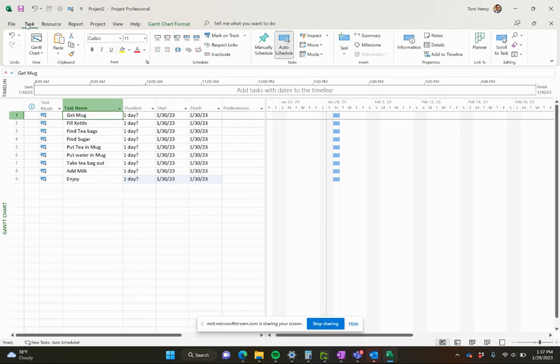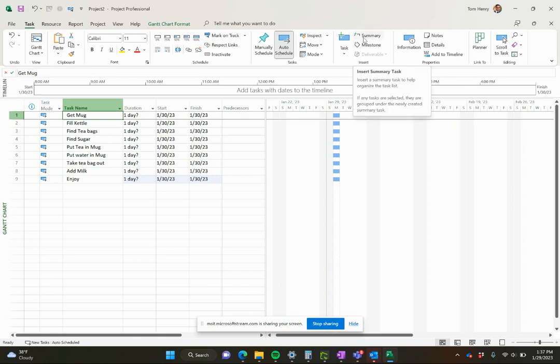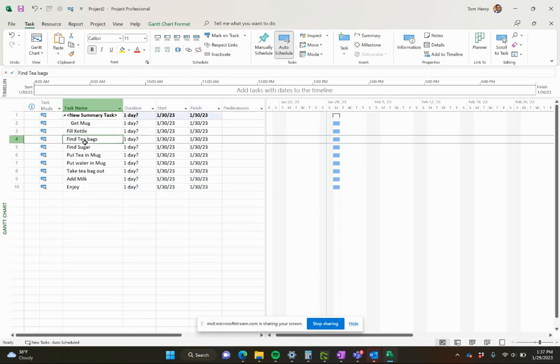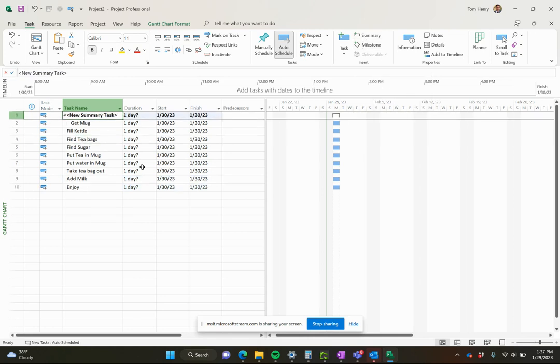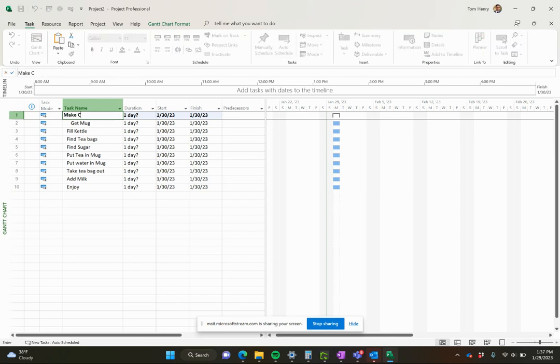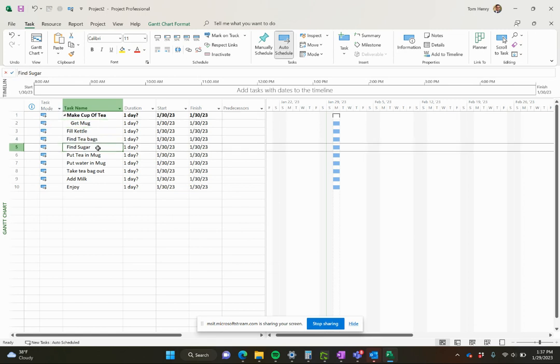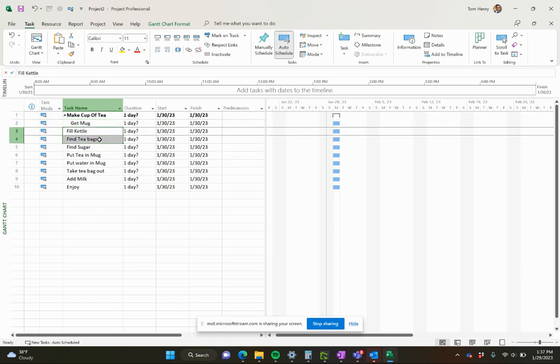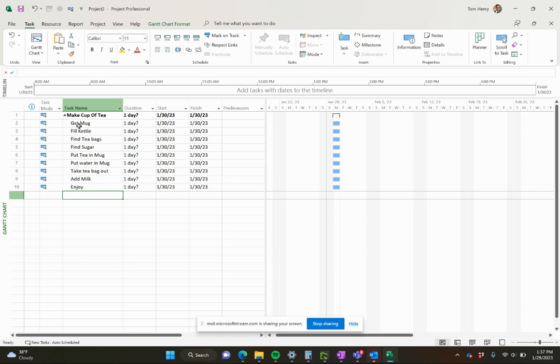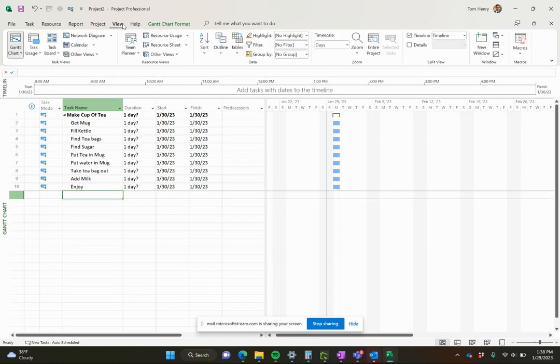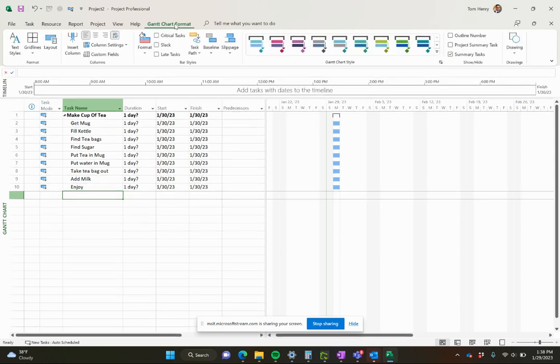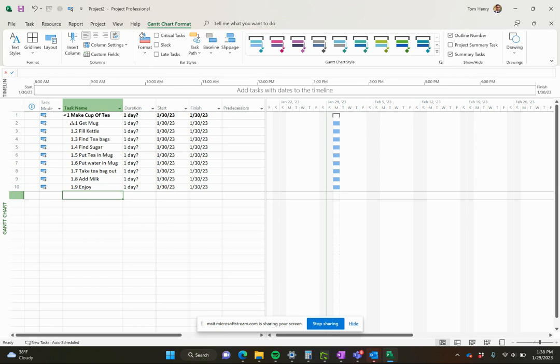So that's all my tasks. I want to actually come to the task ribbon. I'm going to set what's called a summary task. I'll come up here and in the insert section of the task ribbon, I can click summary task. I've now put in a new summary task, and I'm going to call this one make cup of tea. Now you can see by default it made get mug a child of the make cup of tea. I'm actually going to come in here and indent the rest of them because they're all part of that. And if you ever want to see that work breakdown structure, you can actually come into the Gantt chart formats and outline number. One, 1.1, 1.2, 1.3, so on and so forth. So that might be helpful for you.